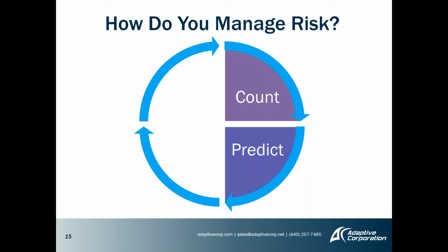Estimate cost and maybe even profit early on in the process. We touched on something similar to this a minute ago. It's a little different take on it. Next, you can be honest with everyone about what you do and don't know as early as possible, especially when it comes to money and cost of your product. Innovia has tools for bill of material costing, and part of this lets you identify whether costs are estimated, quoted, or actual. Real simple, three choices there.